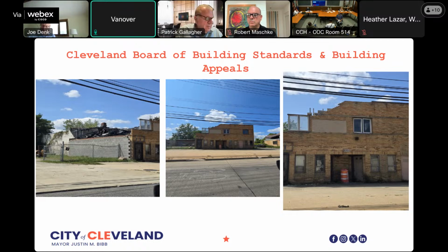We don't object to September 11th of 2024 to make application and obtain the permits required for the interior demolition of this building. And 9/25 to abate the hazardous condition. So that's 2 weeks to get the permit for this, and then based on the appellant's schedule, another 2 weeks to abate the hazardous condition, and then make application for the permits for the rebuild.